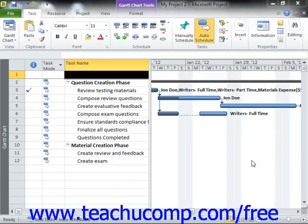Some tasks in a project file are standard and repetitive, such as a weekly project coordination conference meeting. You can enter these types of tasks as recurring tasks within your project file so that you can create that task once and then have it recur on a regular basis, without having to enter a separate task for each instance of the meeting.